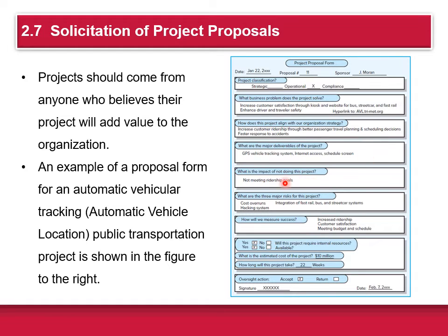Impact of not doing the project, major risk for the project, how you're going to measure the success, estimated cost, how long will it take, and then the selection committee will go through these, and they'll either accept or reject these based on their selection criteria.